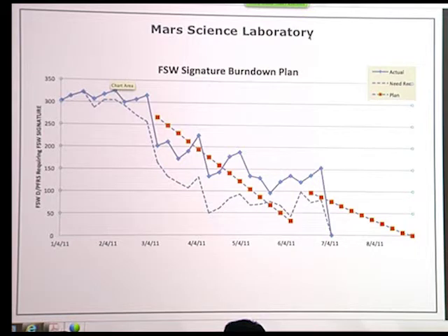So one of the things I just wanted to add to some of the things that Amalaye said that's very important in that closeout process, where I think he was most involved, was ensuring that we understood the root cause of the PFRs, and then that all the proper documentation was taken care of. It was properly summarized for anybody that would look at it in the future. That the retest, in fact, did do the retest that verified the problem, or it wasn't just a retest that passed but didn't happen to actually exercise the flaw correctly, and also that the fix was complete.